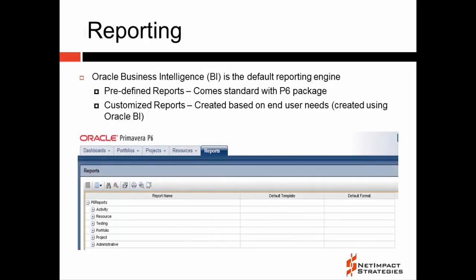Let's begin by looking at reporting. For this presentation, we'll be focusing on using Oracle BI Publisher, as this is the tool that allows access to reports from within P6. But almost any reporting software that can connect to a database will work. There are a number of predefined reports for P6 that will come with your installation of Oracle BI Publisher. However, in addition, you can expand on this library by creating custom reports utilizing the extended schema.